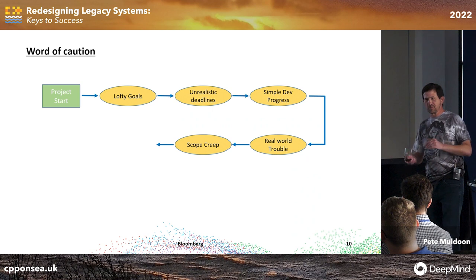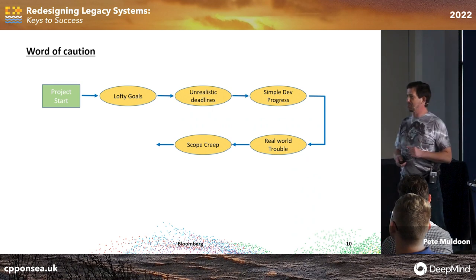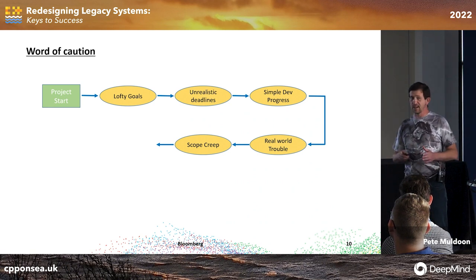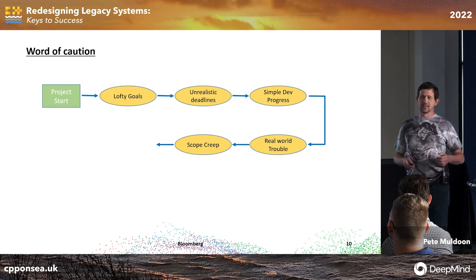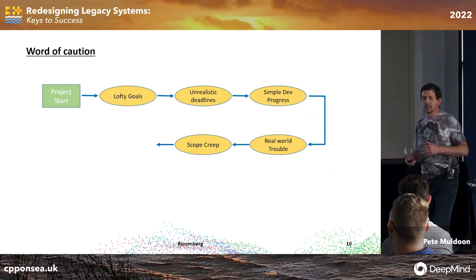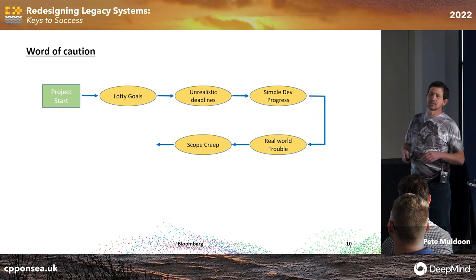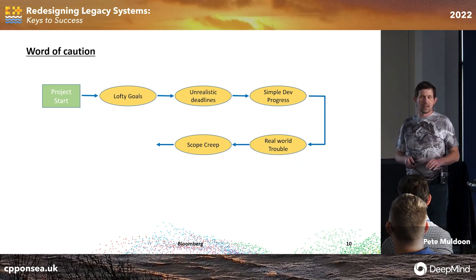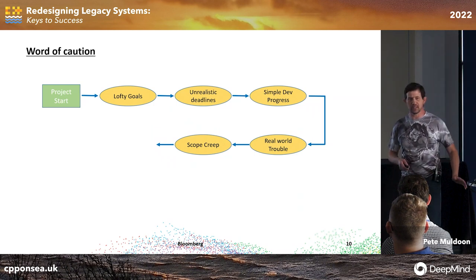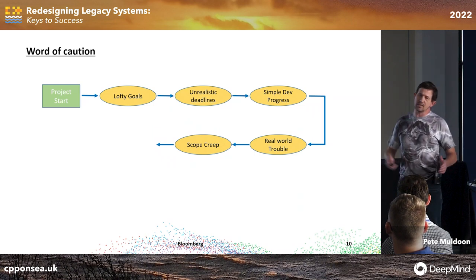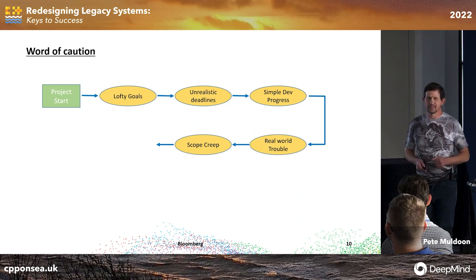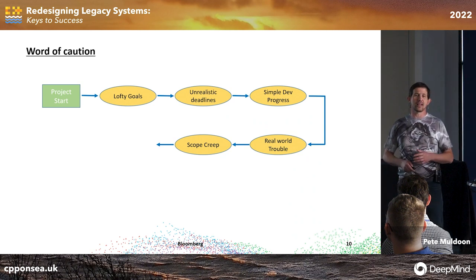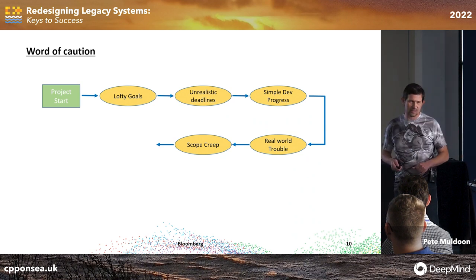And I think scope creep comes in two kinds. There's an implicit scope creep in that you thought it was going to be a lot easier, and now you're figuring out it's not that easy, which means you have to do more, so your scope is increased. And you might get external or explicit scope creep where someone higher up in your chain says, listen, the users have been begging for this. Could you not just slip that in while you're doing this? And you go, yeah, sure. Why not? It'll make the thing sexier when it comes out. But the problem is that it means your deadlines are probably disappearing over the horizon.